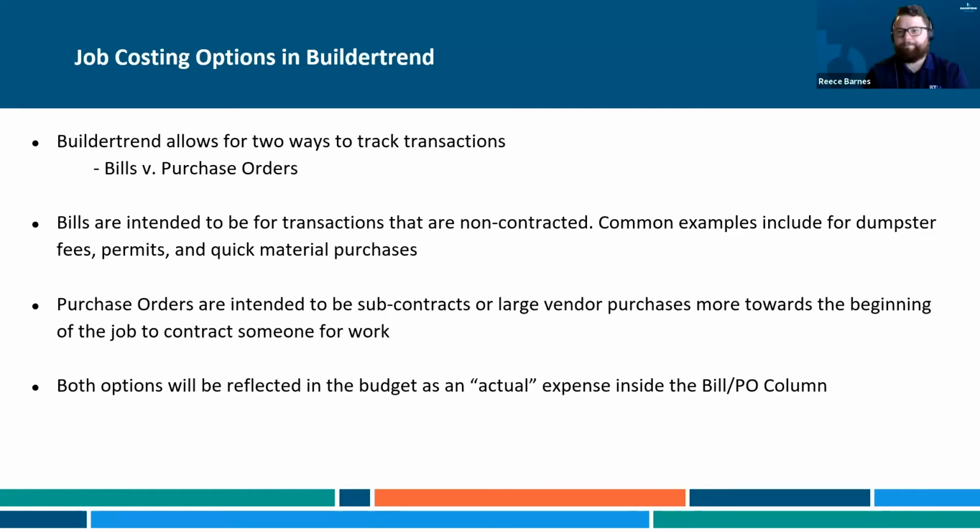The other benefit with a PO that you can't do with a bill is you can make multiple payments against the PO. Installments, percentages. And that's very common in construction, where I'm going to contract you for $3,000 and I'm going to pay you as the phases of the construction operate. So in framing, maybe a 50% down payment up front, first lumber drop, another 25% when you do the work, and then final lumber drop, final frame, you have another 25%, and now the contract is complete and at its full.